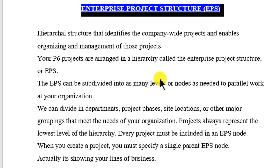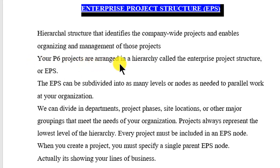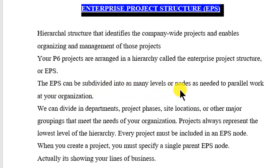EPS is a hierarchical structure that identifies company-wide projects and enables organizing and management of those projects. Your P6 projects are arranged in a hierarchy called the Enterprise Project Structure or EPS. The EPS can be subdivided into as many levels or nodes as needed to parallel work at your organisation.